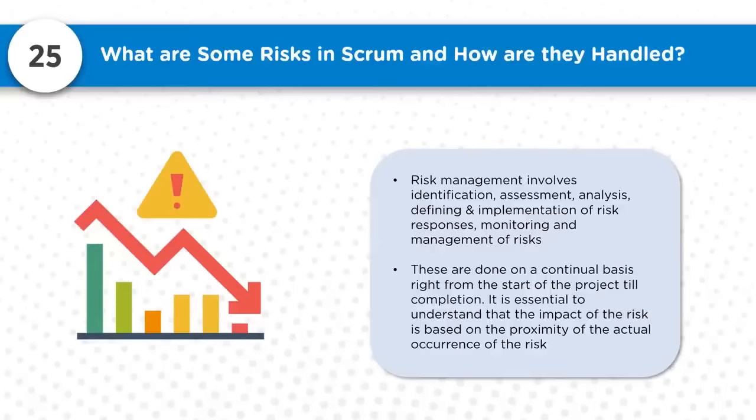So depending on the impact and probability of a risk, if it is a high impact risk, obviously we are required to do both qualitative and quantitative analysis. If it is a simple one with very little impact, you can take the call accordingly, to what extent you may require to analyze and have response plans for it. Once you have defined and implemented the response plans, quite obviously, you should keep monitoring it